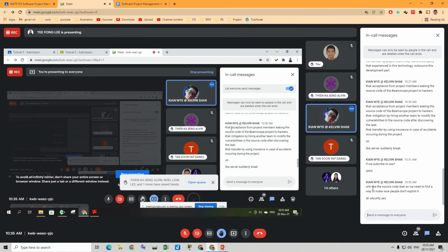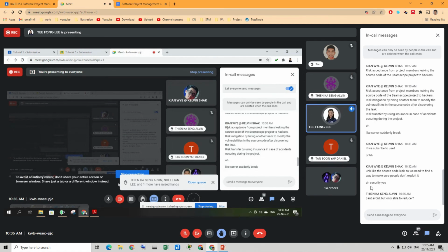Then I just say the risk acceptance is just the employee being sick, and with mitigation we say we have an extra employee ready. This one, acceptance, is more straightforward. We just accept the risk, ignoring the impact. It says accept the risk that has a very small chance, so we don't invest in avoiding it. One more time: risk acceptance is like since the risk is so low, we just don't invest money to avoid the risk.